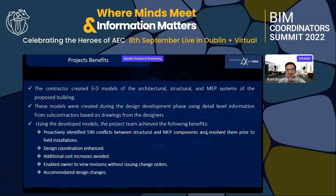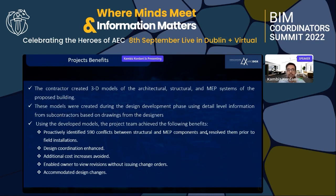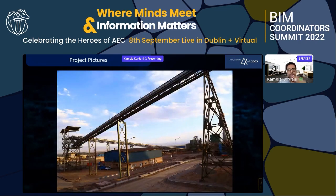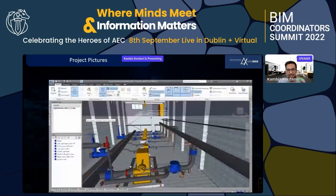The project team proactively identified 590 conflicts between structural and MEP components and resolved them prior to field installation. Design coordination enhanced cost savings by avoiding additional cost increases, and enabled the owner to view revisions without issuing change orders. In countries like Iran and other developing countries, change orders can really damage a project and create extensive disputes between owners, subcontractors, and contractors.